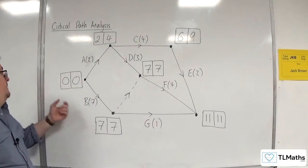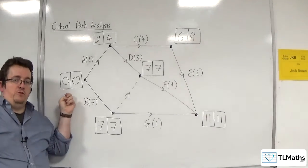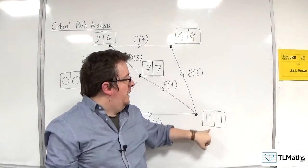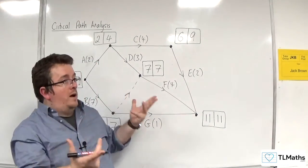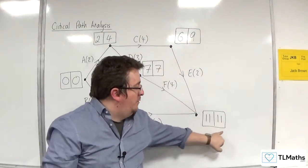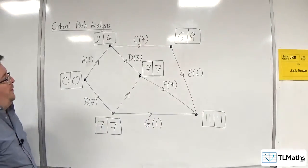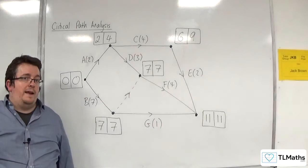So you should always find that for your start node, it should always be zero, zero. And the end node should be the shortest time that it takes to, the time required to complete the project in both of those boxes. So that is how we complete the forward and backward paths through an activity network.